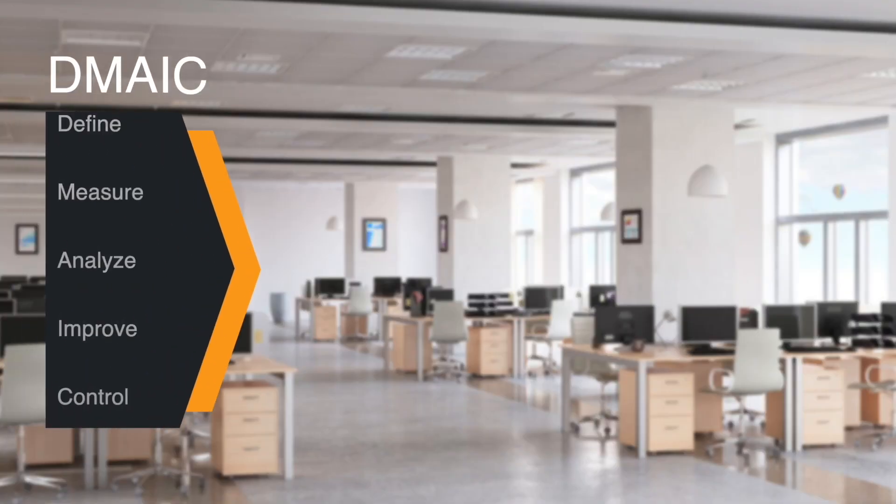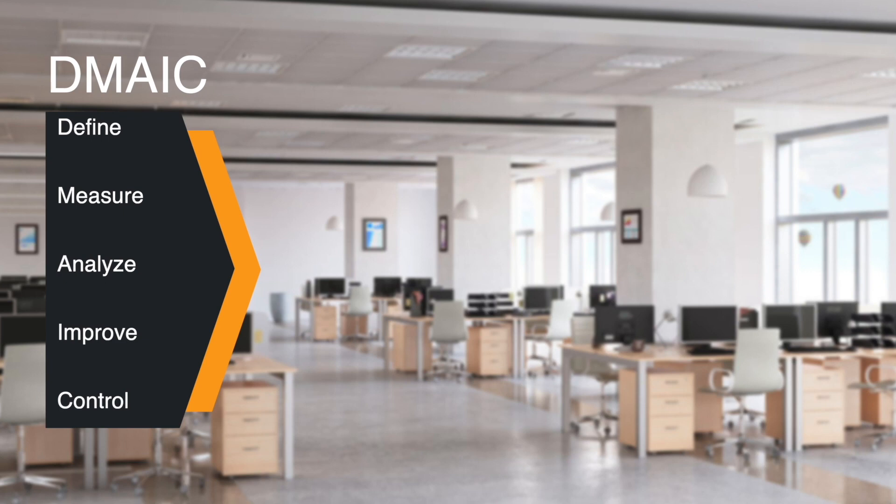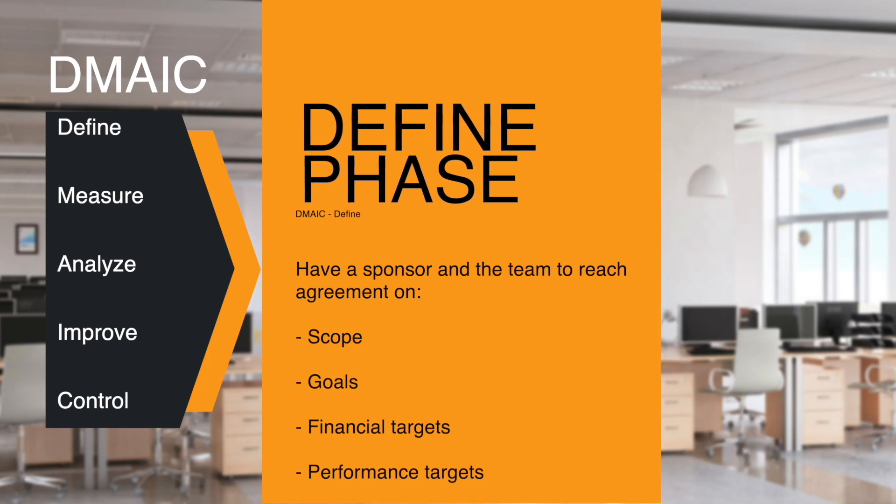The first phase of the DMAIC process is Define. In this phase, you need to have the team and sponsor reach agreement on the scope of the project, goals, and financials, as well as performance targets for the project.